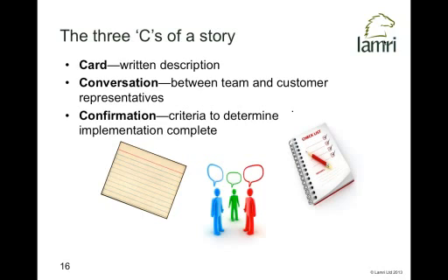Basically the card, and that comes from the idea, following this collaborative visual approach, of just using index cards to write your stories on. Deliberately there's not much space there, so I can't write War and Peace on that index card. I can write a very brief, terse description of it, and I can also write up some criteria about how I would know when I've completed that story. What should be true when it works, and that's the essence of my test criteria for that story.